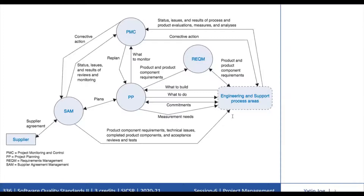The Project Monitoring and Control process area contains practices for monitoring and controlling activities and taking corrective actions. The project plan specifies the frequency of progress reviews and the measures used to monitor progress. The progress is determined primarily by comparing project status with the project plan. When the actual status deviates significantly from the expected values, corrective actions are taken to overcome those deviations. These actions can include re-planning, which requires using project planning practices.